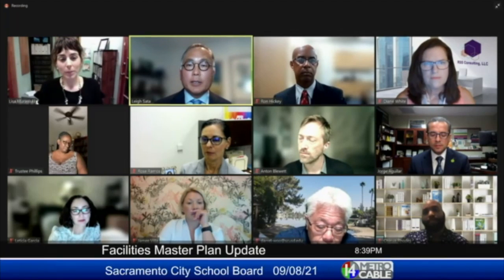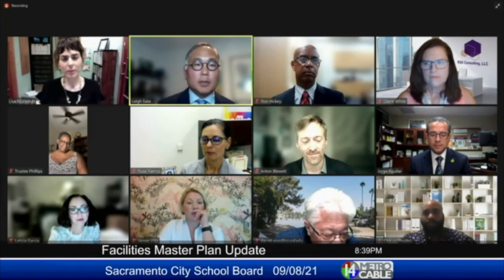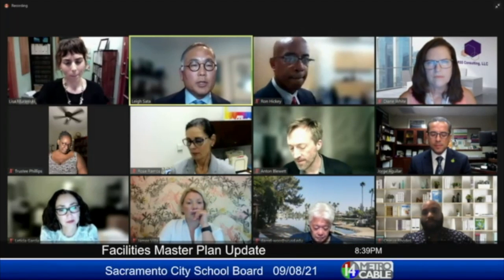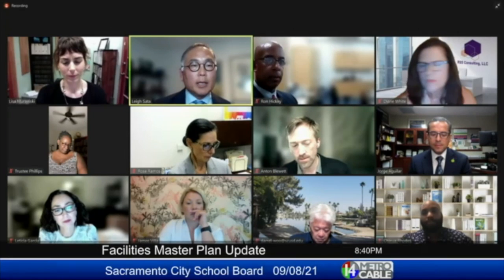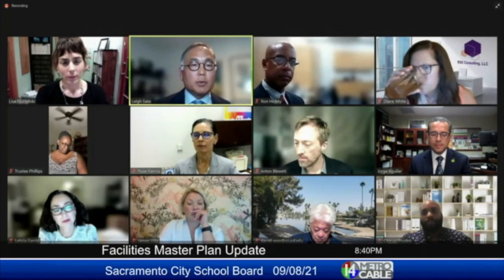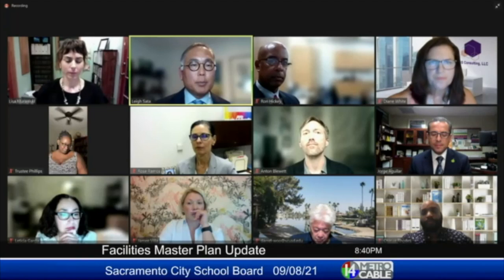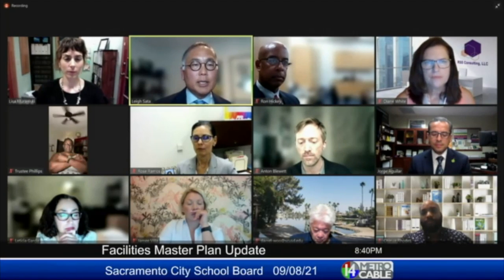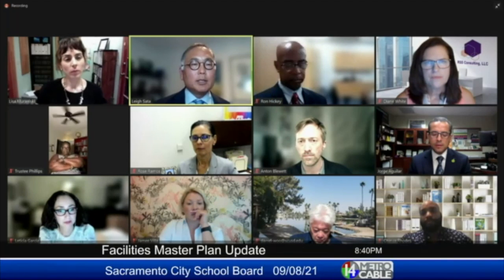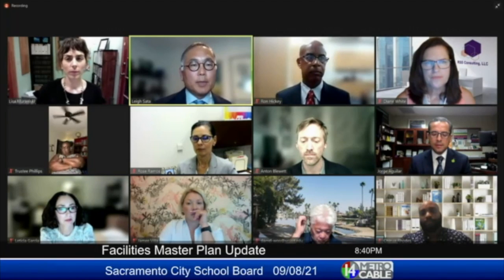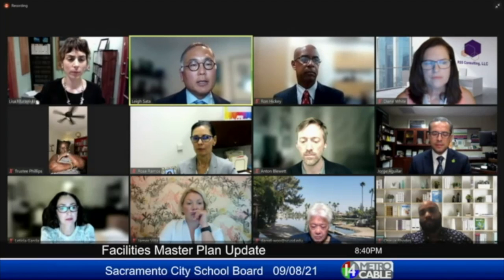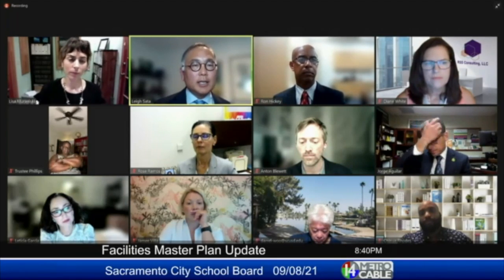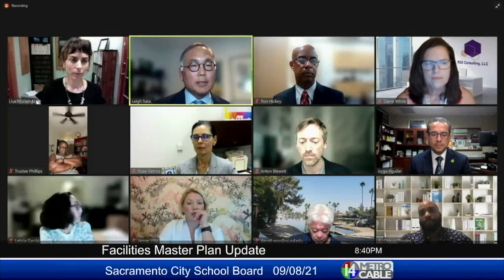So there's a couple of ways that I'm going to answer that question. The first is to build on what Rose just suggested. There are roof issues at many, many, many schools. And we may come to you with a list of projects where we group them together. We may say this project is going to repair the roofs at this dozen set of schools. And we're doing a dozen because we get a much higher buying power and it's a much more economically efficient way to manage a project, right? But we're going to be looking at that facilities condition index to identify which roofs need to be replaced.